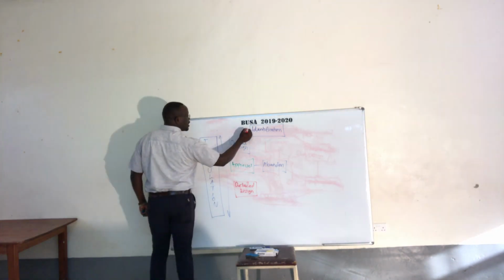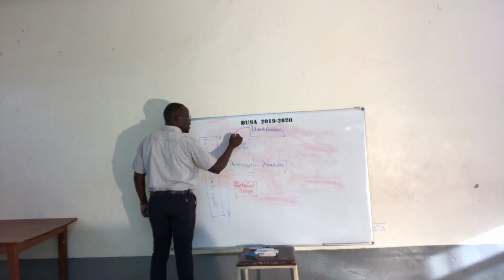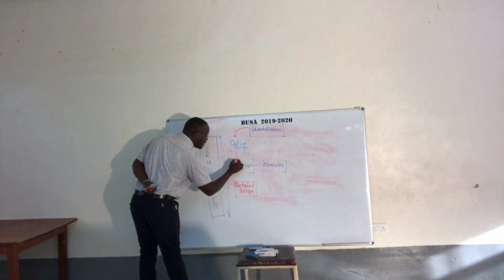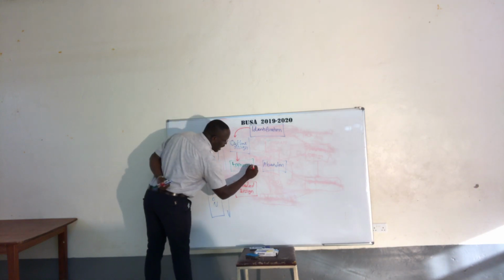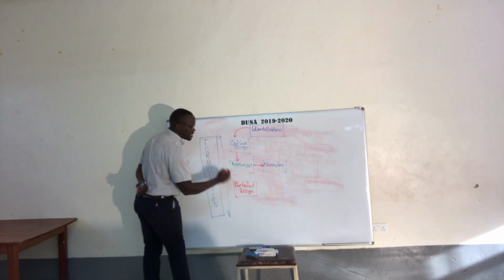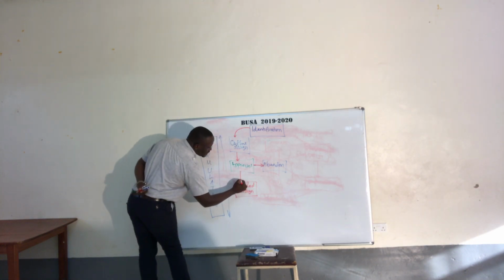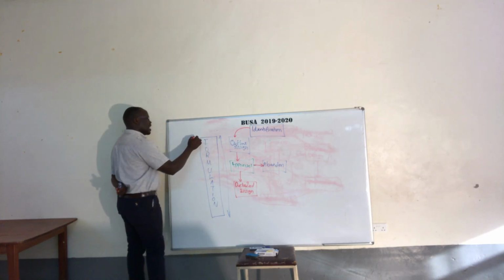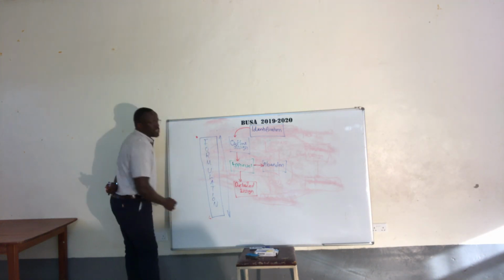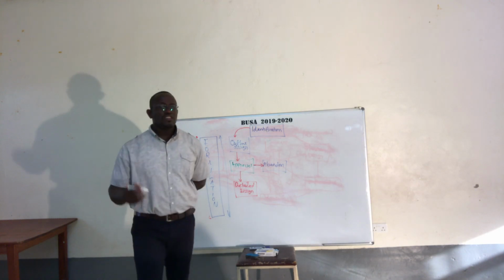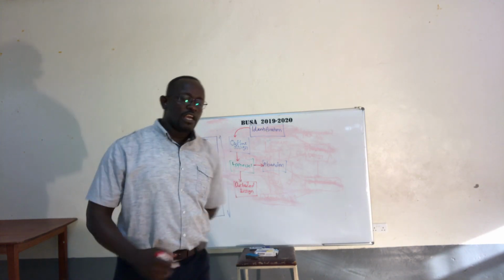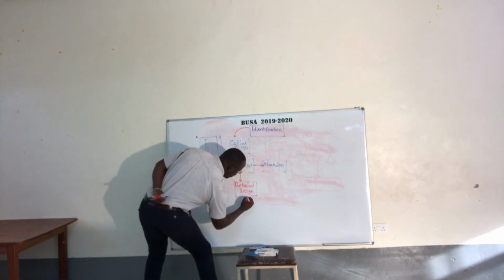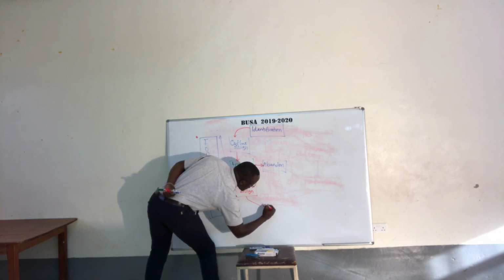So identification works with outline design, and outline design works with appraisal. When you appraise, you abandon and accept, and then you have what we call a detailed design. All these are involved in the formulation of the project. Now, after going through that second tedious stage, you come to the 3rd stage of what? Implementation.